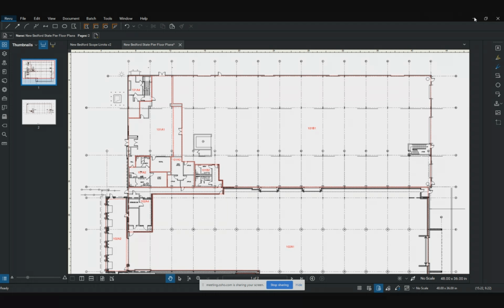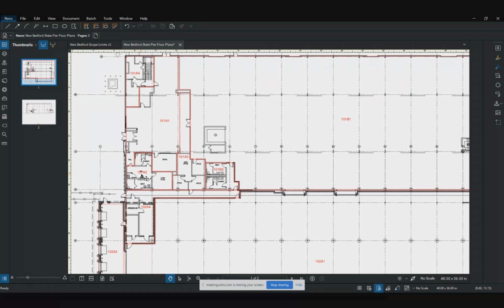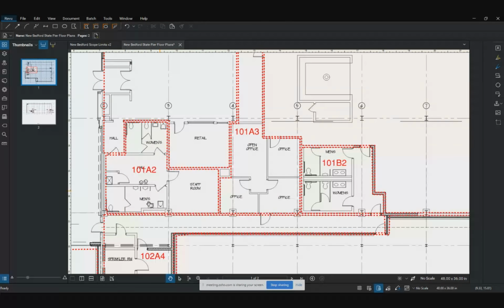And then sometimes here, you can see the plumbing fixtures, but many times we don't price the fixtures individually. We just give it a square foot number. It says, okay, you have 3 rooms here, and they have a rough number, like 1 toilet for 100 square feet or something like that. So you can guess there may be about 5 or 6 fixtures in here.